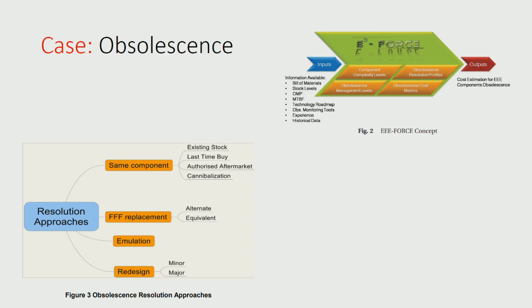The most expensive thing you can do is wait for it to break, find out there's no one there to replace your part, and then have to redesign, re-engineer a whole new replacement part while the project just waits, doing nothing, earning no money, creating no benefits, while this obsolete part is redesigned into a non-obsolete part and some sort of replacement made during the life of the project. So the impact of obsolescence is absolutely dramatic if you want your project to be available and performing and earning benefits for you. So if your ventilator's broke and there was no replacement part, the best thing to do would be to throw the ventilator away. Perhaps. There's all sorts of different things.